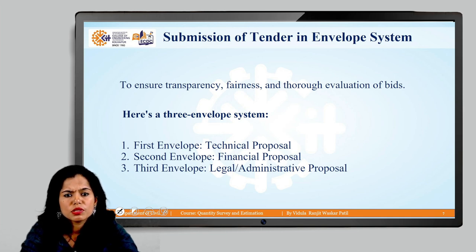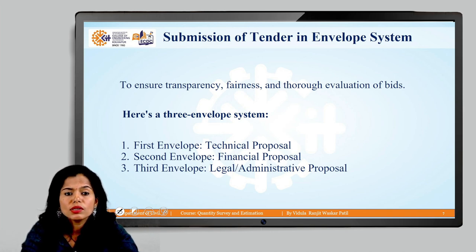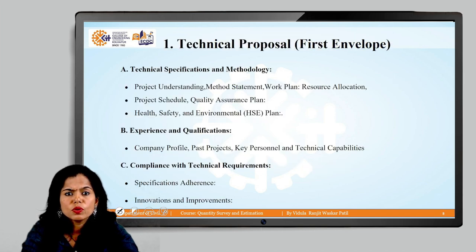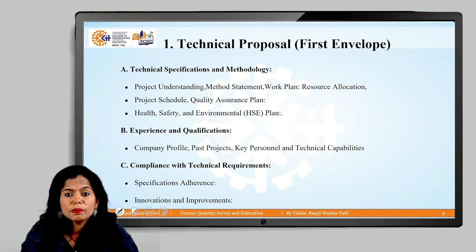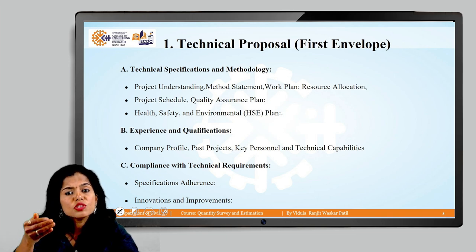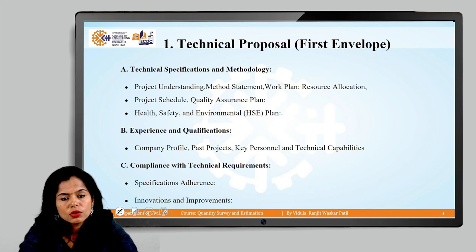Submission of tender is done in a three-envelope system. The first envelope contains the technical proposal — project schedule, quality assurance plan, health and safety plan, environment plan, company profile, past projects, key personnel, technical capabilities, specifications, and any innovative design. Only technical information of the contractor is included here.